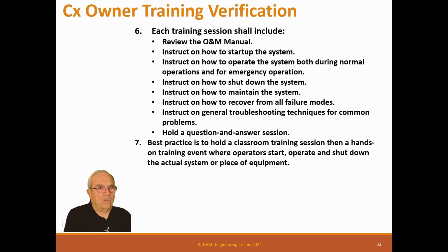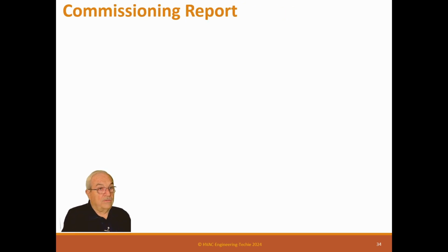Best practice is to hold a classroom training session, then a hands-on training event where operators start, operate, and shut down the actual system or piece of equipment. Remember, this is training, so they need to know.